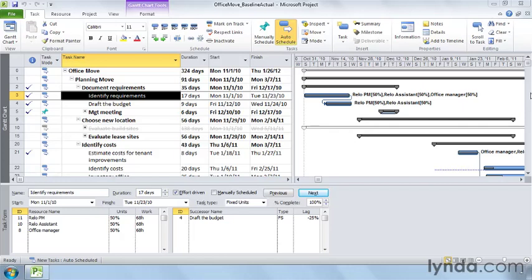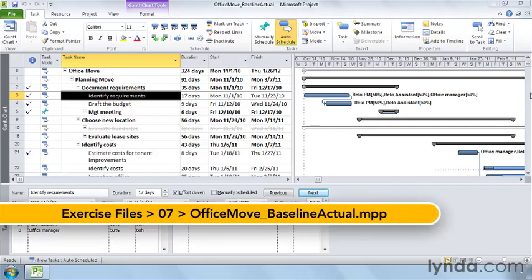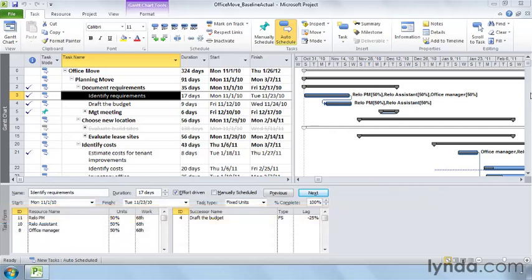When you finish your project plan, you can save it in Project in a baseline. Those are the target values you aim to achieve when you execute your plan. As you work on your plan and project, you see the current plan, which is your schedule and cost based on changes you make to the plan, along with the effects of actual performance. Project uses baseline values and current values to calculate the variances and other performance measures.